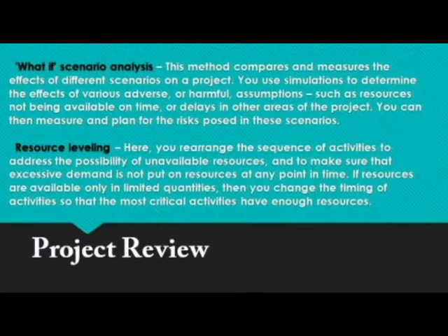Second on project review is resource leveling. Here you rearrange the sequence of activities to adjust for the possibility of unavailable resources and to make sure that excessive demand is not put on resources at any point in time. If resources are available only in limited quantities, then you change the timing of activities so that the most critical activities have enough resources.